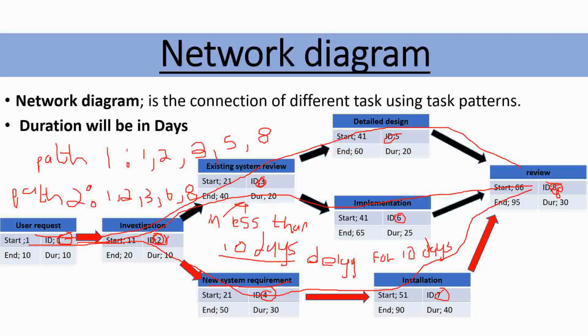So in order for you to determine your critical path, you must choose tasks within your critical path which do not have a slack time. If you are working with many tasks, each task may have a slack time, like this path.